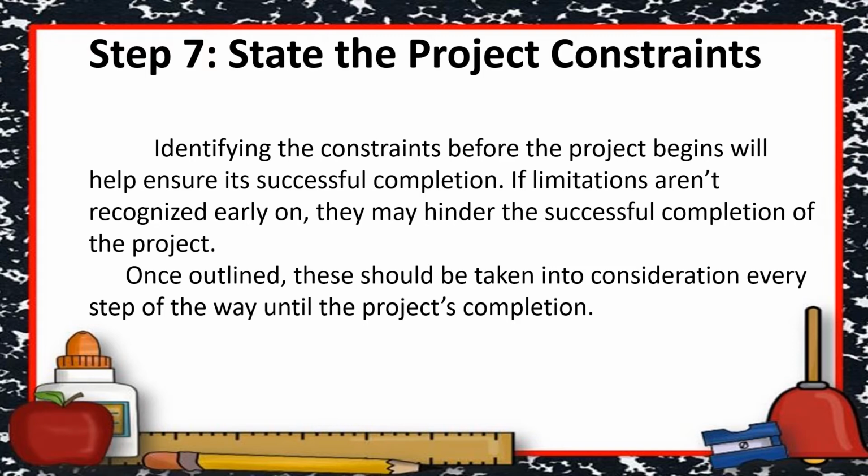So, for instance, if the schedule is not negotiable, state it in this section and all personnel will understand that an on-time schedule should dictate their decisions during the process. Some other constraints in relation to the procurement process can be cost, scope, limited resources, and technical specification.